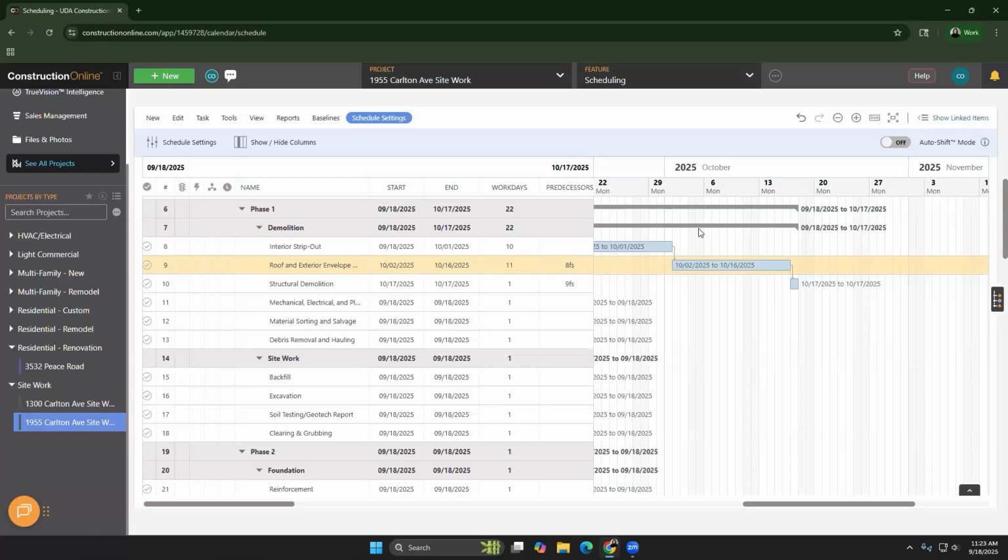On the other hand, if they need to start around the same time, you have the start-start relationship. You also have start-finish, which is basically finish-start in reverse. So if I have a relationship that is set as start-finish, I'm saying that task 9 cannot start until task 8 has finished, or vice versa. So it's just kind of a different way to put it in, but I would say that the majority of what we see is that finish-start relationship in the system.